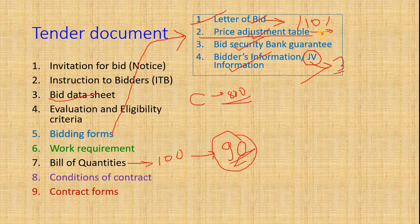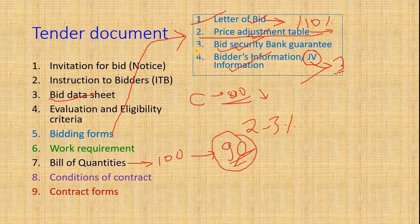The Bid Security Guarantee is a bank guarantee submitted while submitting the bid. It is generally two to three percent of the estimated amount. Bidders need to submit it either as a bank guarantee or in cash. If submitting in cash, they deposit in the account of the office. If submitting as a bank guarantee, the bank prepares a guarantee which is then submitted to the public entity.